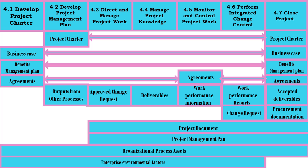Inputs to Direct and Manage Project Work: any component of the Project Management Plan may be an input to this process. The Change Management Plan has a very critical role since approved change requests are implemented here. For example, if an approved change request requires a small change before implementation, the Change Management Plan can be reviewed to see if the Project Manager has authority to approve it based on impact to scope, schedule, budget, quality, or other constraints before involving the Sponsor or Change Control Board.